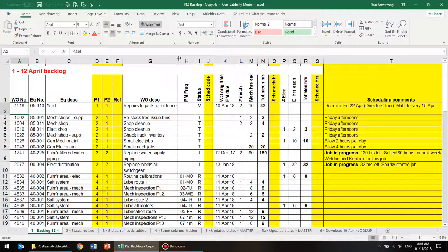And it may be affected by dependencies. For example, you have to get some work done in advance for a shutdown. Now in the example I'm going to use here, there are some jobs that can only be done when an order for the Hopkins company is being run. And that happens only once a quarter, and it just happens this order is being run in the week we're scheduling for. So we need to make sure we go down a little further down the priority list to find any of the jobs that are in that category.